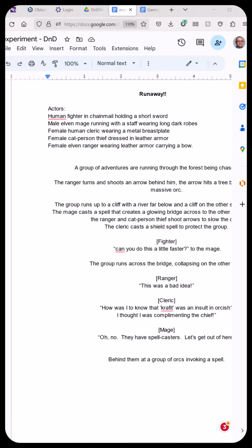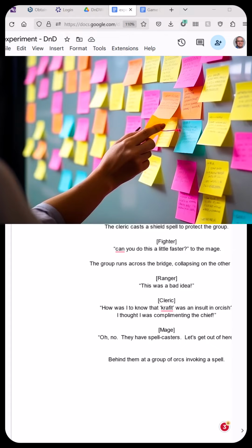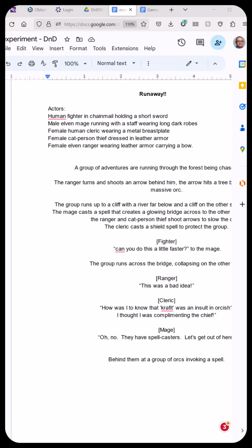The next step, once you have a script and buy-in from your team, is to start creating your task list. Now, the task list is traditionally done, if you're working face-to-face, with Post-it notes. Everybody gets a little pile of Post-it notes and a Sharpie and starts writing down the tasks. Granularity is very important when we're figuring out tasks.